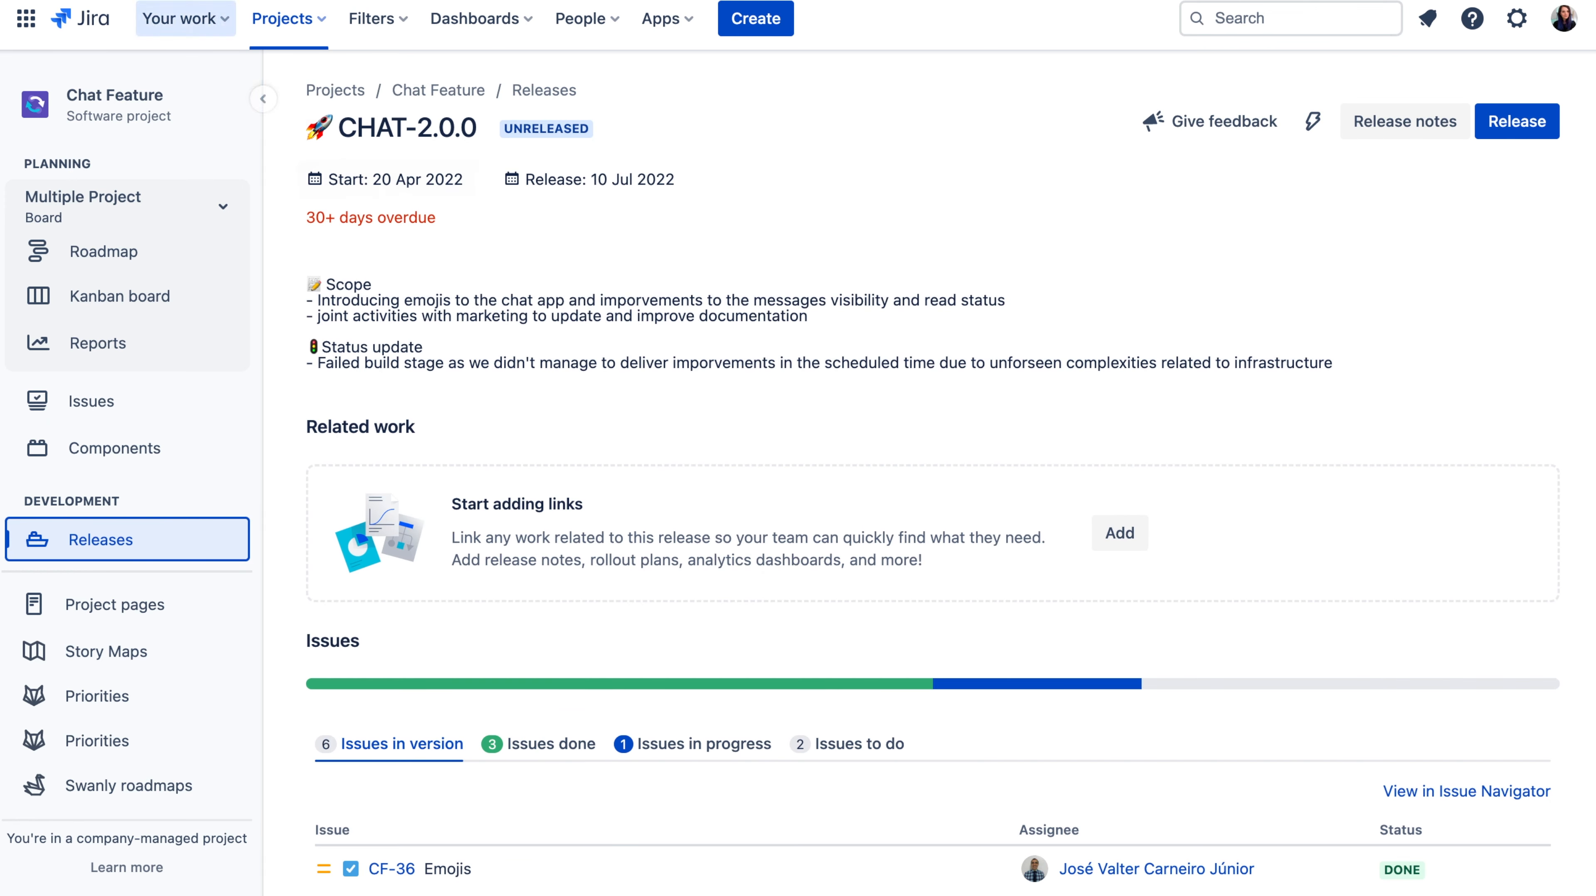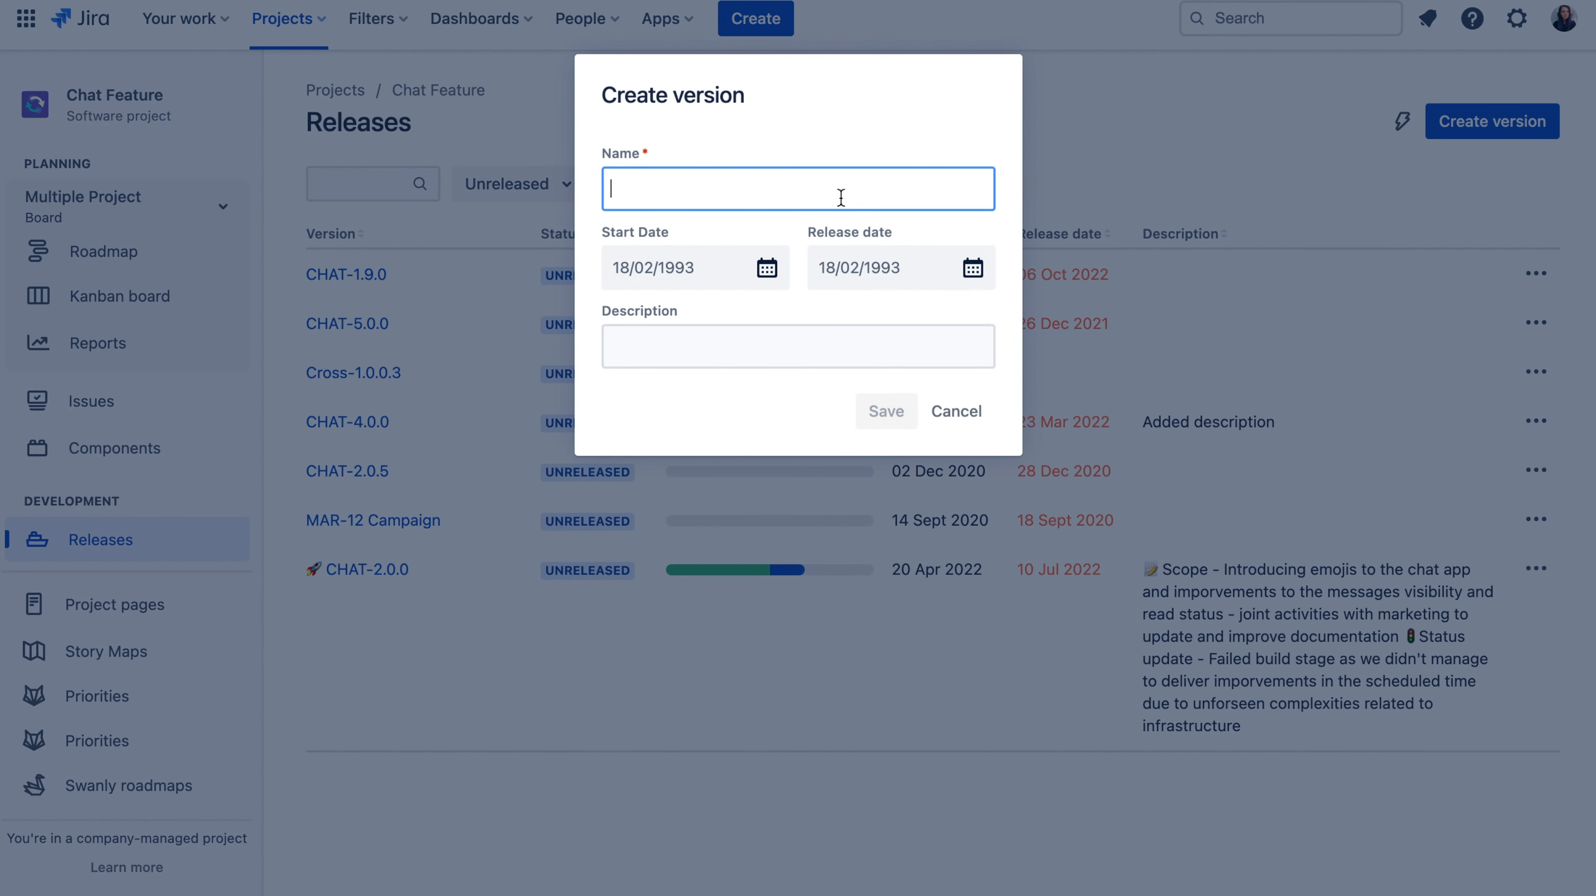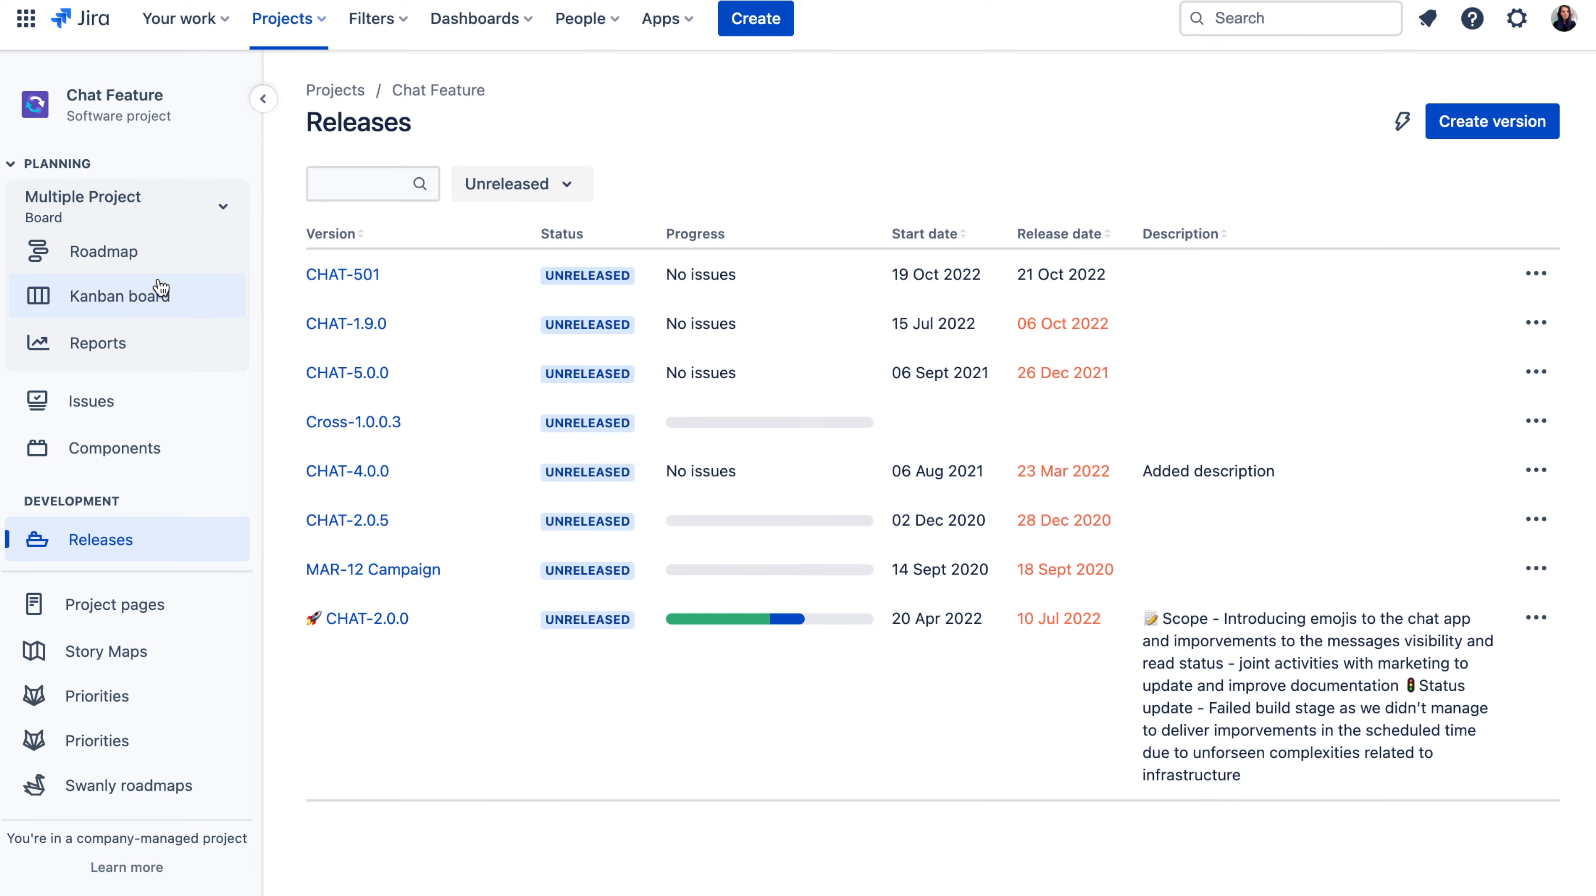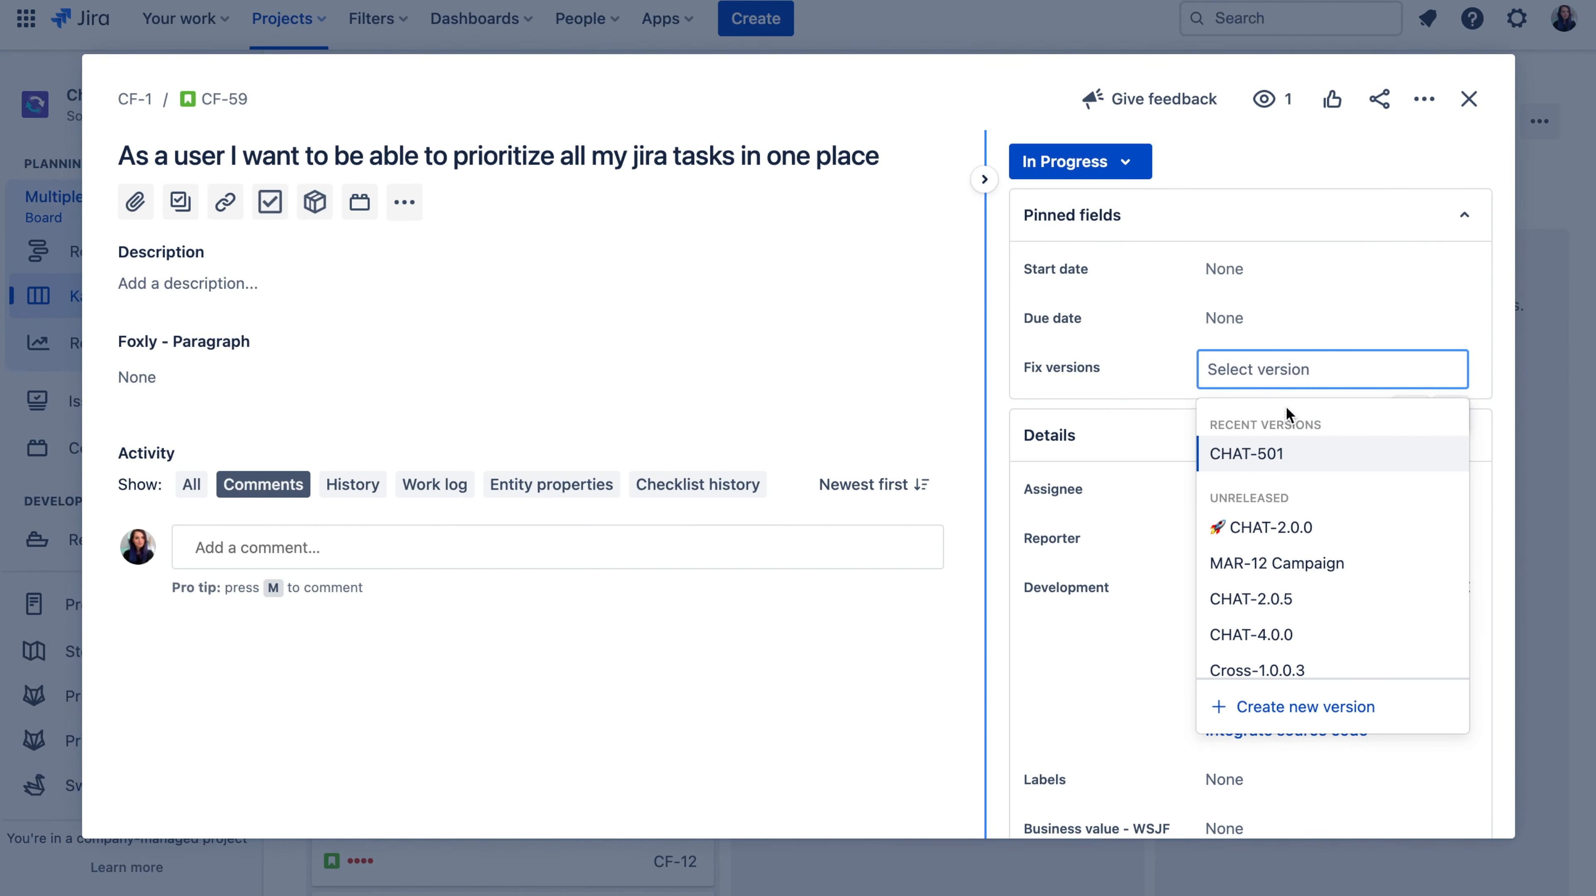Here in the release tab, in your project menu, you can create a new fixed version, give it the name, description, start and end date, and then link tickets to it using the fixed version field in your Jira issues.